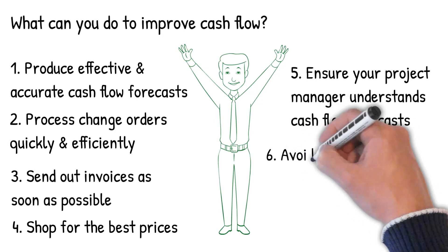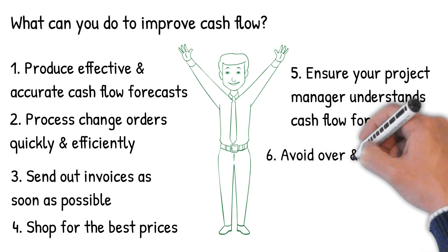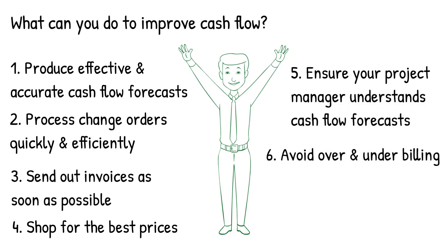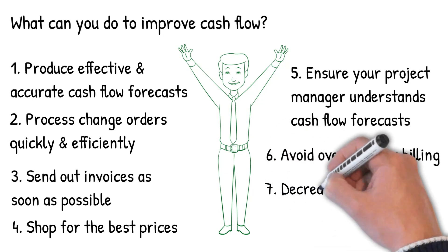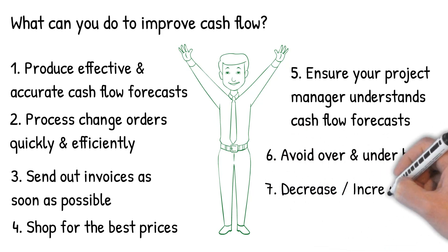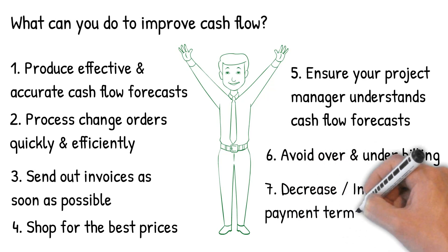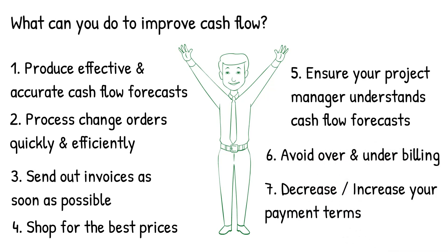Avoid over and under billing — try to make your applications and invoices accurate to the works you have actually carried out. Decrease your payment terms, but increase the payment terms of your cash outflows such as subcontractors wherever possible.